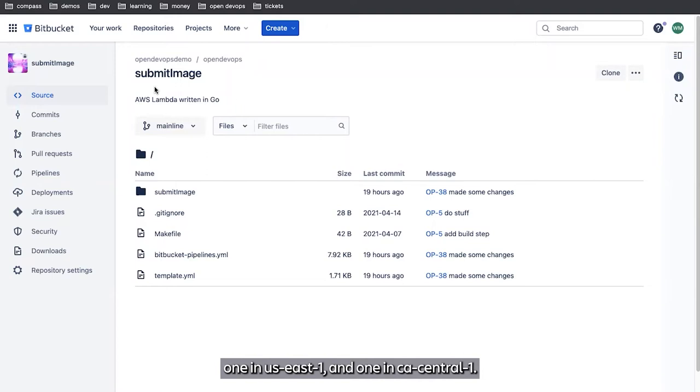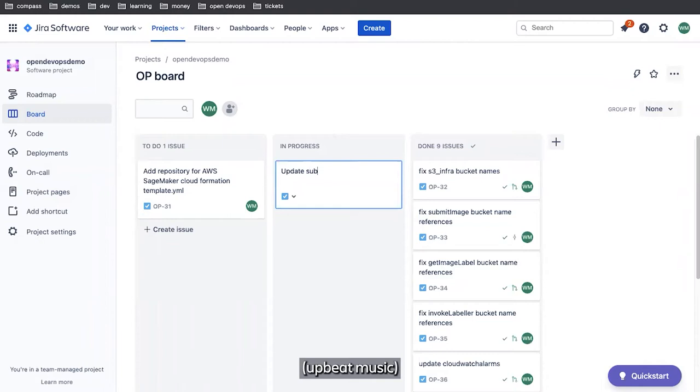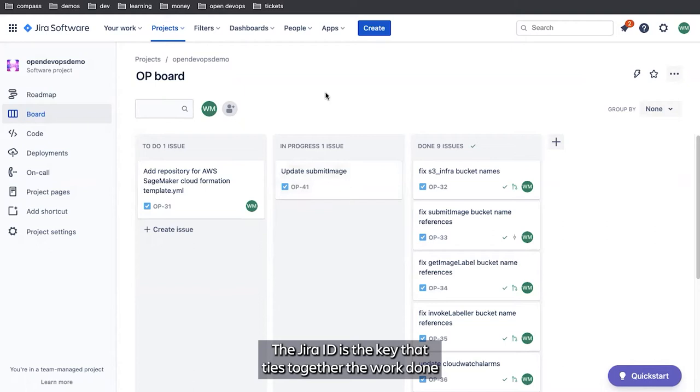So to deploy a production change, the first thing we're going to do is jump over to JIRA and create a new JIRA issue. We're going to make a note of the JIRA issue ID. The JIRA issue ID is the key that ties together the work done on the coding side and our JIRA issues.